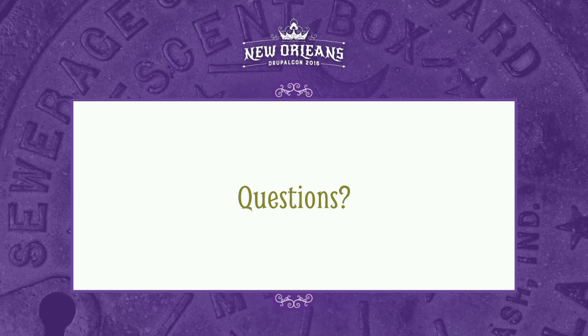I always try to build in wiggle room. Wiggle room is actually a technical person's best friend because they're very used to making things very concrete and solid, and it's really important to build that wiggle room. So on a 3,000-hour project, a lot of it starts off with discovery. We need to actually learn, how do I know from a 5-page RFP that I'm going to be able to actually deliver on the scope of work? So having that discovery, but then taking bite-sized pieces, because it's a huge undertaking to understand the scope of that size of project. So you say, okay, I'm going to talk about this specific thing, and divide it up into pieces that you can then further break down.